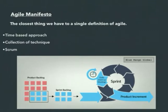Agile is heavily flow-based working. This is work based on backlogs. Suppose I have a high priority item or task, I'm going to categorize them as sprint. These are the backlogs as you can see on the screen. So in the next couple of days or next 2 weeks, I'm going to work on those items which have high priority, which is named the sprint backlog. Once they are complete or finished, we can pull over the next set of items, and this completed work will be shipped or committed.